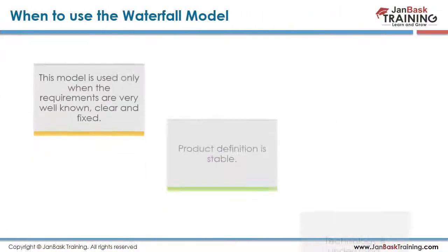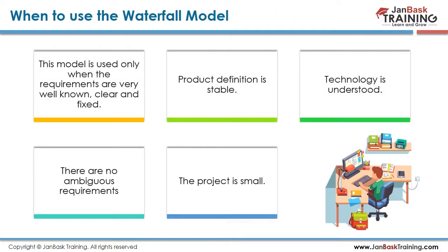Now when we are talking about waterfall, I want to add one more point. That doesn't mean that we have stopped using waterfall now, right? We are only using it in cases where the requirements are very clear and crisp, or in the past we have done it or have prior experience, or in projects which are very straightforward. We have to develop something, we have docs in place, and there are no dependencies on other teams or any issues around implementation, legal or anything else. So we can strictly go ahead with developing those. The model is used only when the requirements are very well known and clear.